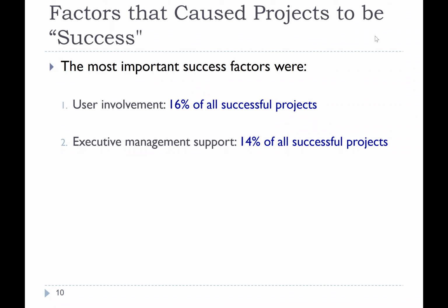So the way it works, it's not like building a cake, where you build the whole cake and then once you deliver it, you get the money. Matter of fact, you might even have to pay for the cake before. But software projects are really, really big and you need to bankroll them. It's uncommon that a company, even a big company, will say, keep all your money, and once we deliver and everything is fine, then you pay us. That usually doesn't happen. So money keeps coming in month by month, installment by installment.